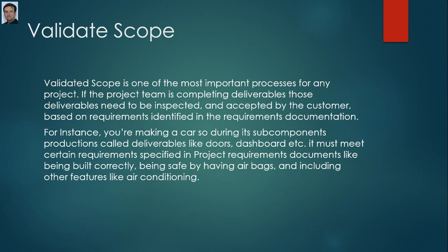If the project team is completing deliverables, those deliverables need to be inspected and accepted by the customer based on the requirements identified in the requirement documentation.